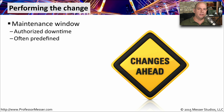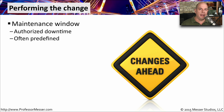In most organizations, there's going to be a formal change control window — a maintenance window that has already been set aside so that changes always happen within a specific time frame. It might be Friday night between 8 and midnight, or Sunday morning between 1 AM and 5 AM. There will always be a window where you're authorized to make these changes, as long as they have been approved.